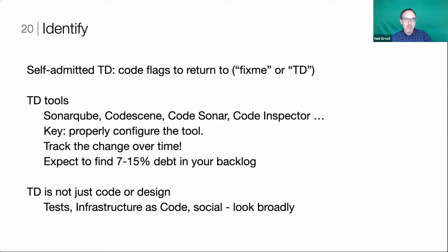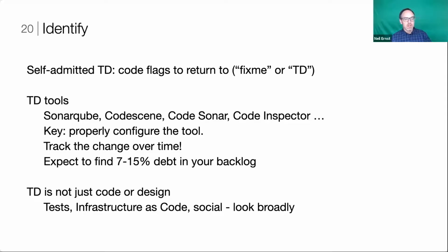As I mentioned, I think you should probably aim for something between 7 to 15% of your backlog to be technical debt. I think it's a good thing because it reflects that you don't know all of the requirements for your system, and as a result, you're taking some risks. You can't really make good advances in software if you're just doing what's expected of you. So some technical debt reflects the fact that you are trying things that may or may not work out in the long run.